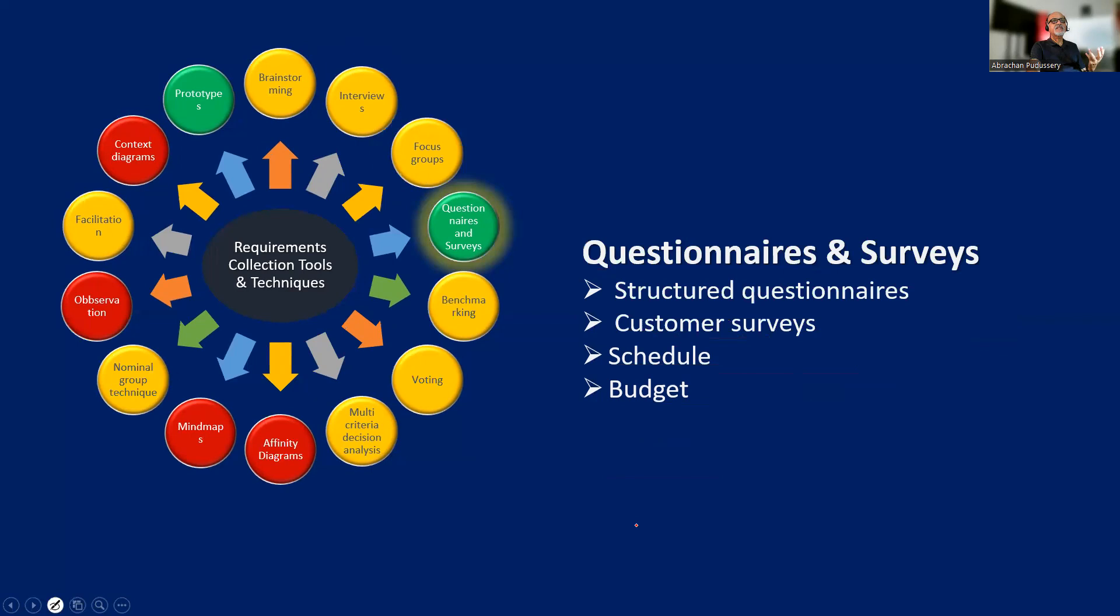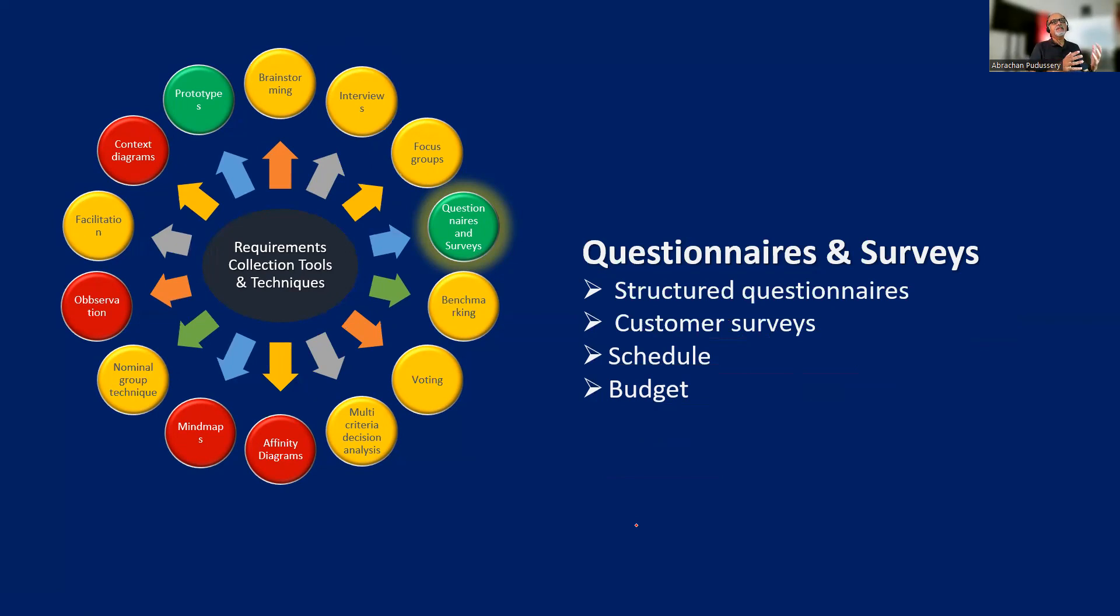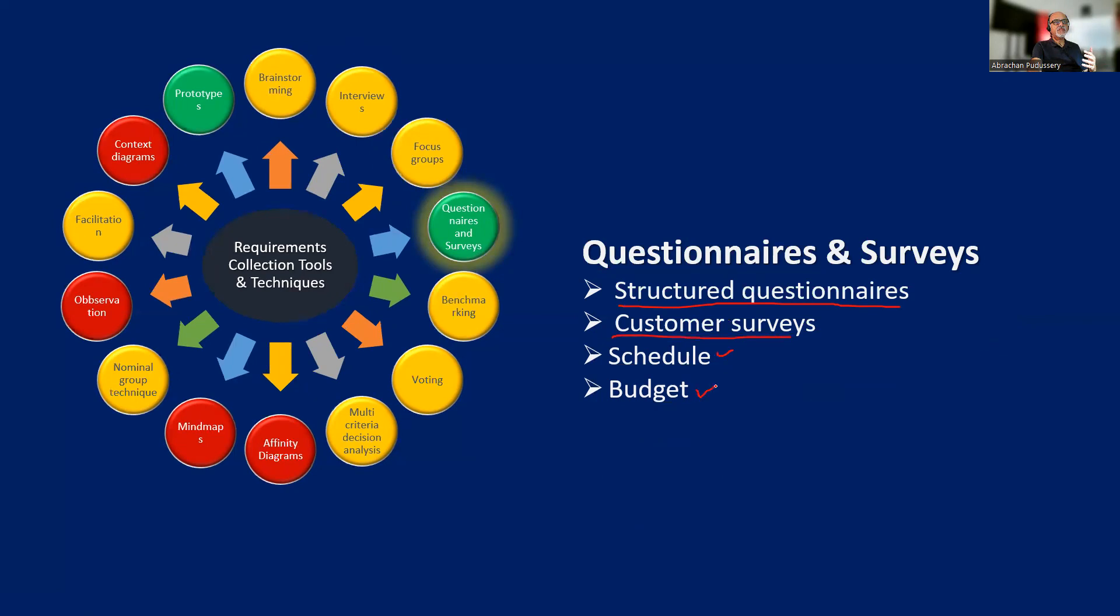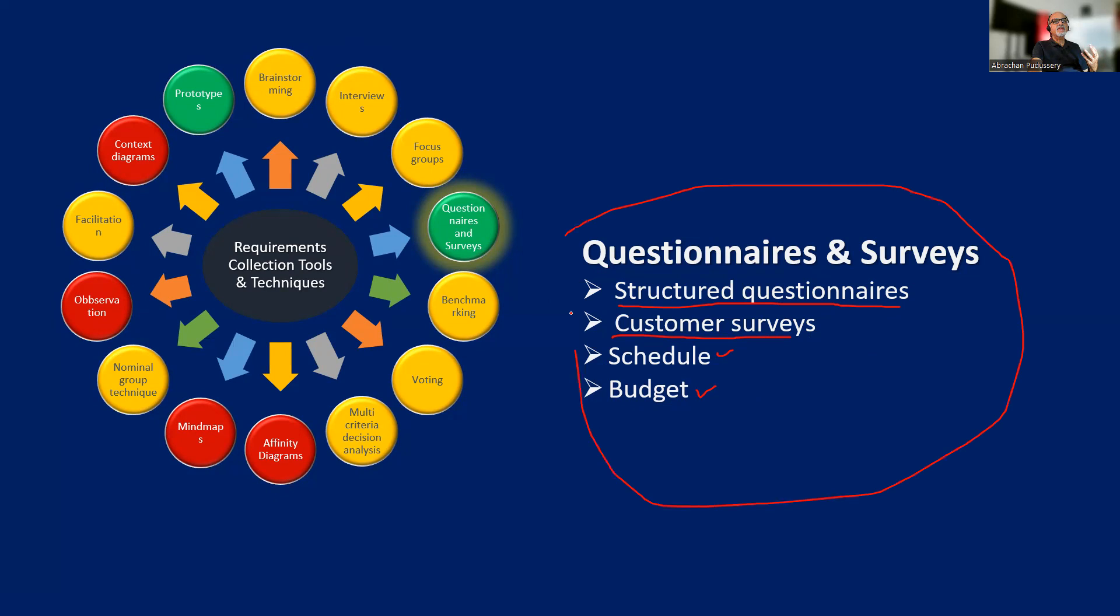Then questionnaires and surveys. If you want to get the inputs from a large number of people, then the most preferred approach would be questionnaires and online surveys. We're talking about structured questionnaires and customer surveys. There will be efforts spent on designing the questionnaires and conducting the surveys, so these need to be budgeted.